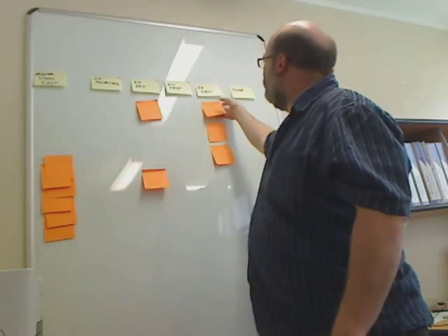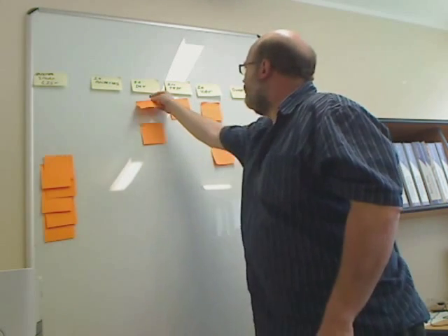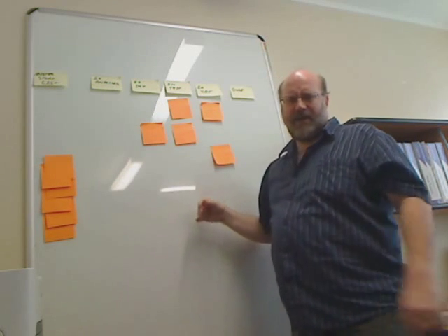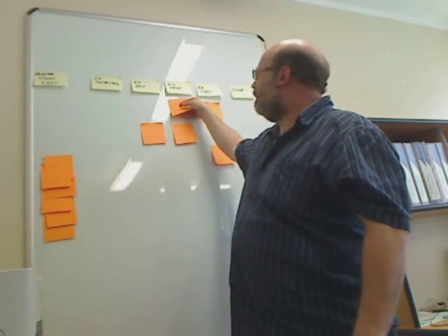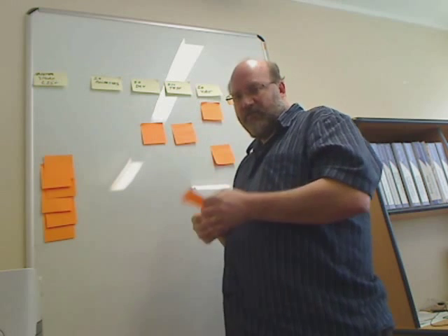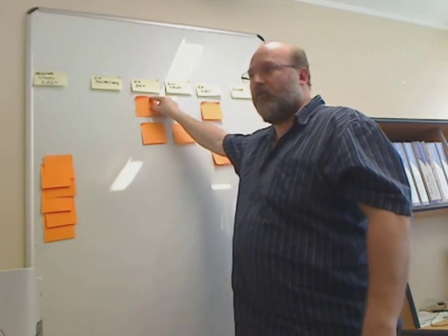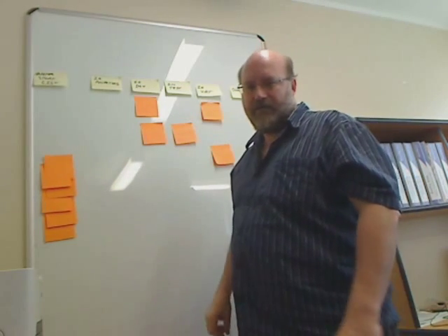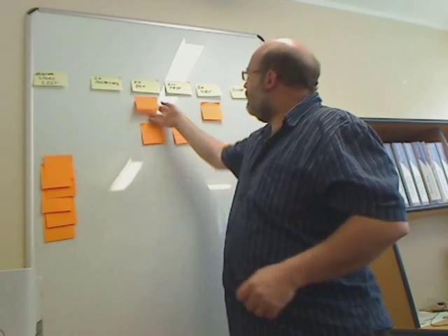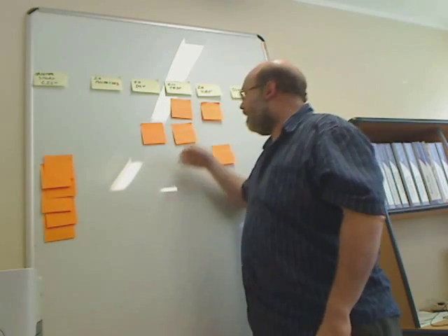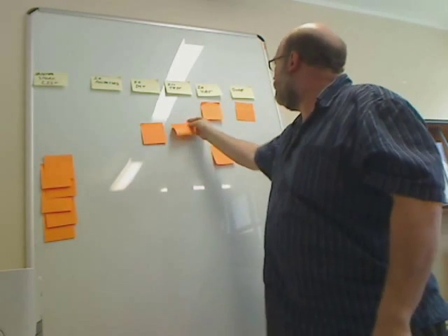Another thing that happens is, what if a story fails a test case? So let's say we're looking at something like that. We've got a couple of stories in test and it fails. Well, at this point we don't raise a defect, we don't record it on a bug log, but we do make a note, either in the electronic repository, but certainly linked to the story, of what test has failed and why it's broken, and we put it back into the in-dev state. The developer then picks it up and works on it, and it moves forward into the in-test state, and if things have gone well, it moves forward into user acceptance testing, and it moves into done.